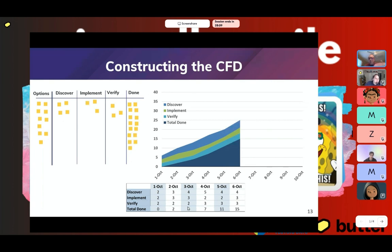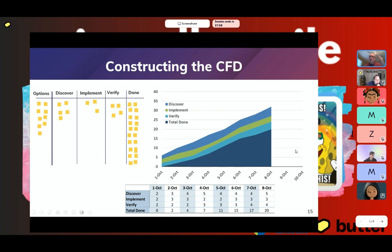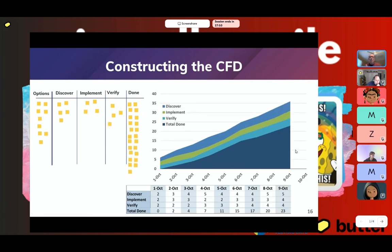As our days continue and as we move items across the board, we can see that we are building out that flow. Every day is a snapshot. Notice the cumulative total done is increasing. That bottom band is the total done, and as we take a snapshot each day — I usually like to take a snapshot after the standup because people have probably moved some things — I'll build out the CFD to show something like this.